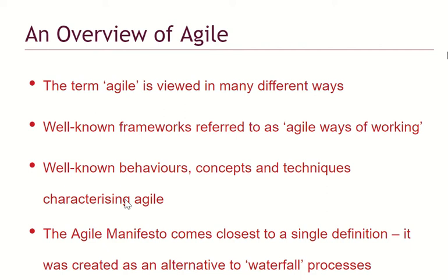You pause, you discuss again: what is the next stage? You start the next stage. You pause after it, maybe plastering the house inside and out. After that, what is the next stage? Interior. Like that. That is the Agile way of working. Waterfall is where you agree everything in advance, and the challenge with that is that it becomes difficult to make changes. Even where changes are possible, it comes at a very huge cost.